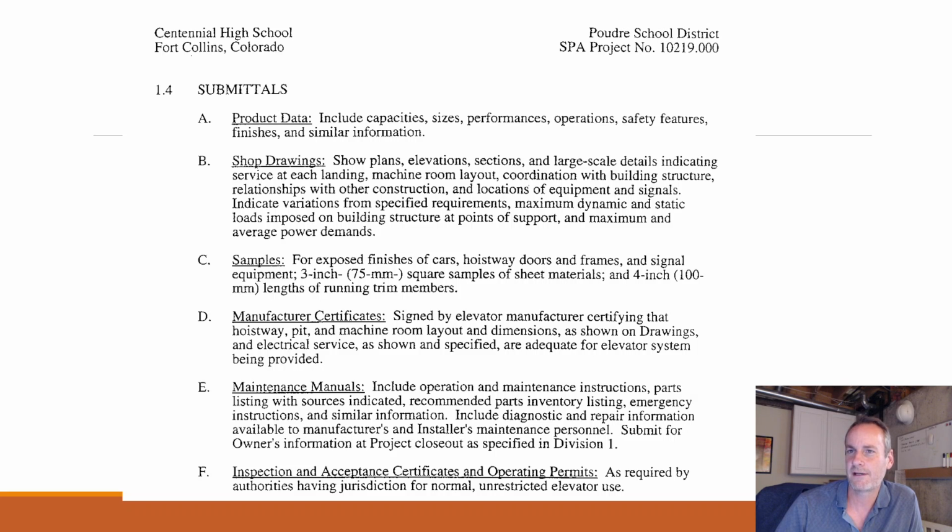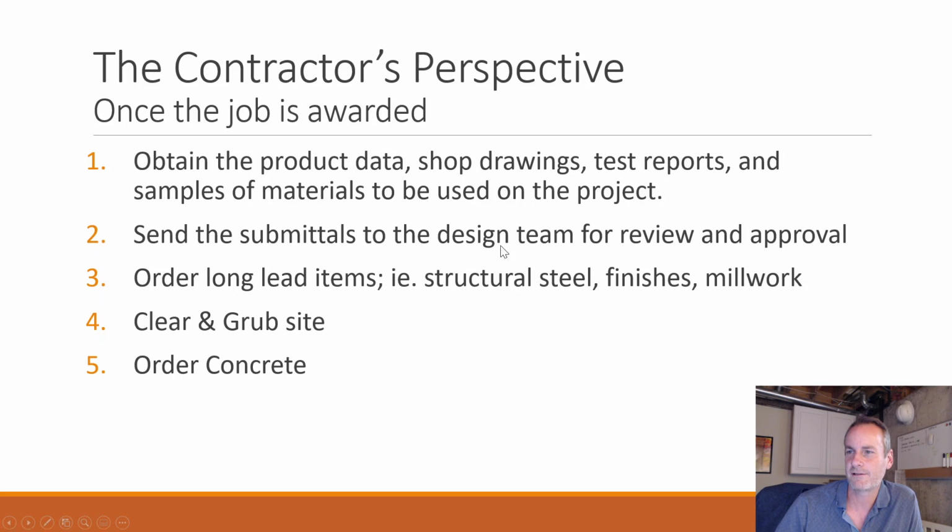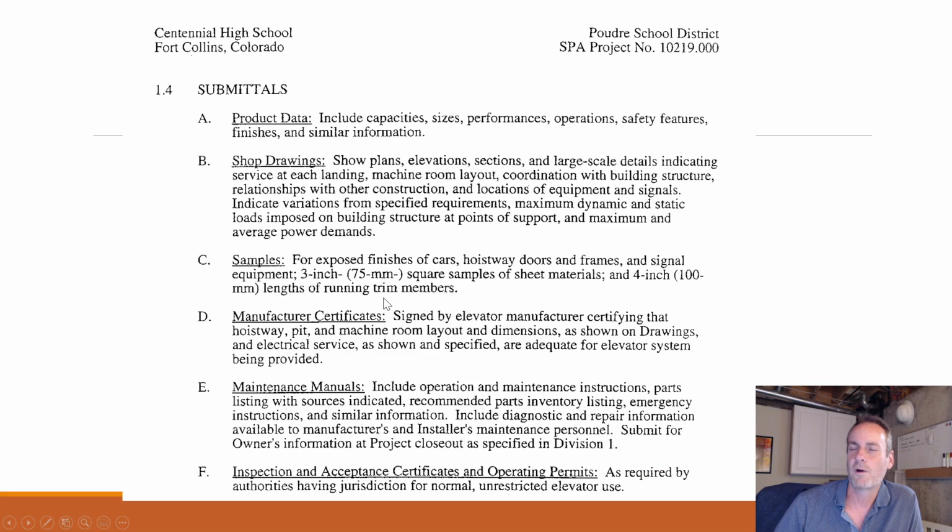some submittals. When we said send submittals to the design team for review, what kind of submittals might be needed? These would be a typical set of submittals that, as a contractor, you need to submit, like product data, shop drawing samples, manufacturer certificates, and so on and so forth. And this would all be stored in some place, probably by multiple people, right?